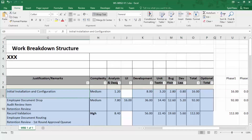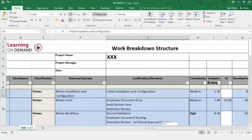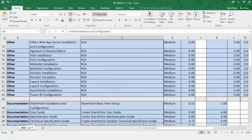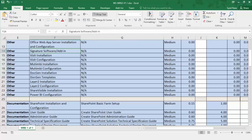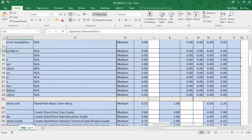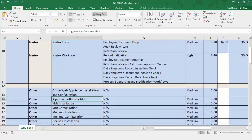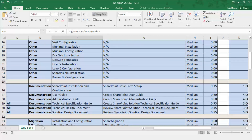For instance, installation and configuration — the initial install and configuration — is going to take about an hour and 20 minutes; development is going to take eight hours, and so on. These numbers are provided by the respective departments from the team leads, so you as a project manager have a better understanding of the total hours spent on each task and subtask. In this particular project, we did the doc gen installation, the Mohimbi installation, and the Bisit installation and configuration — each entailing a set of hours. If a task has zero hours, that's something we're not actually doing, although it was part of the WBS.